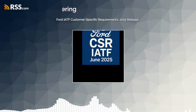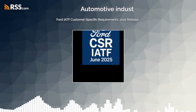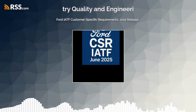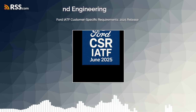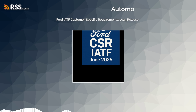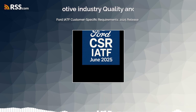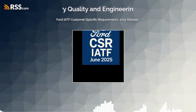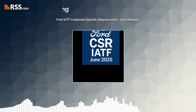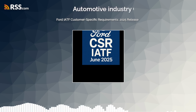What about the tooling used to make those prototypes? Even disposing of that is controlled. Seems like overkill, maybe. That's right. It might seem like it, but you might think once the prototype phase is over, you can just scrap the tooling. But the document specifies a formal process involving Ford's Global Asset Management, GM, and requires approval from Ford PD Engineering before prototype tooling disposal authorization is given. Huh. Why? It highlights how strictly Ford manages assets and maintains control over even temporary tooling associated with their parts. They own it, they control its fate.